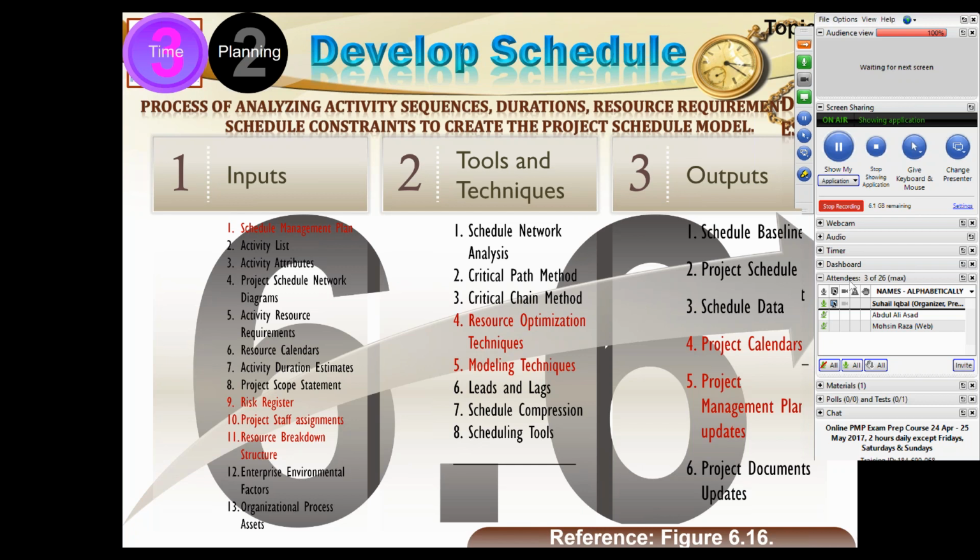And then the same way the thing escalated, and when it reached the project manager, it was 10 days. So actually a 2-day job has been inflated to 10 days and nobody noticed it. Everybody thought it fair, and they allocated 10 days to this activity. So the activity which could be done in 2 days is scheduled to be done in 10 days.